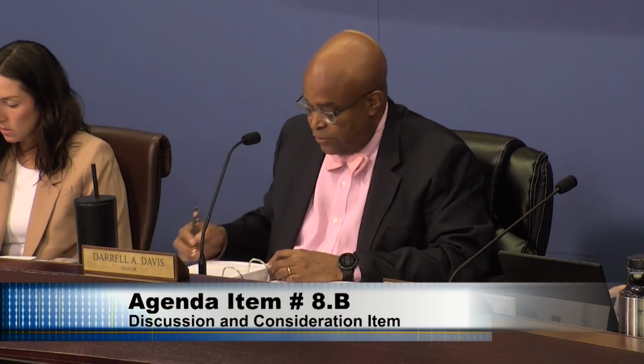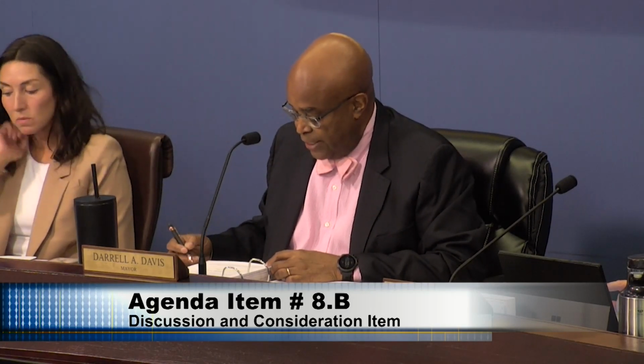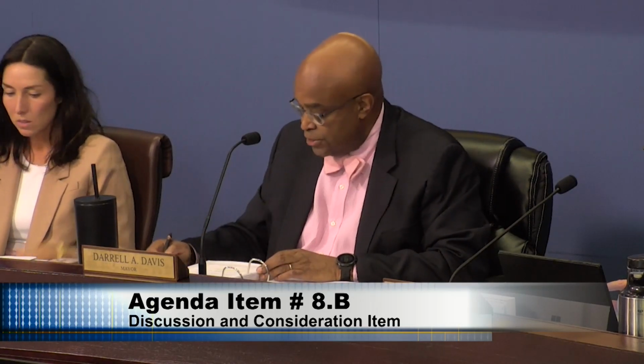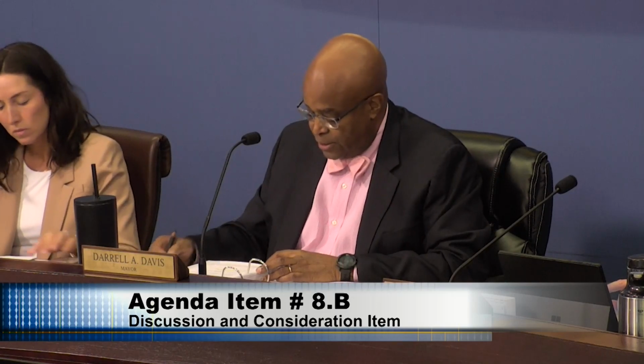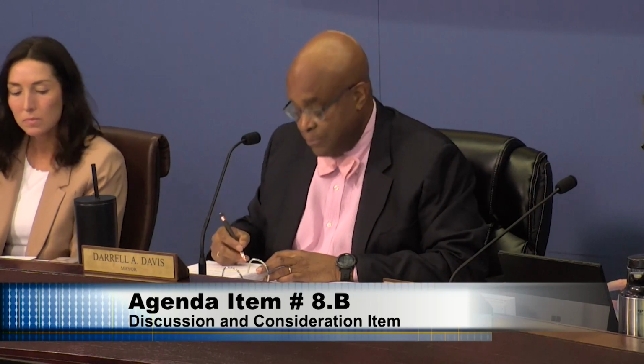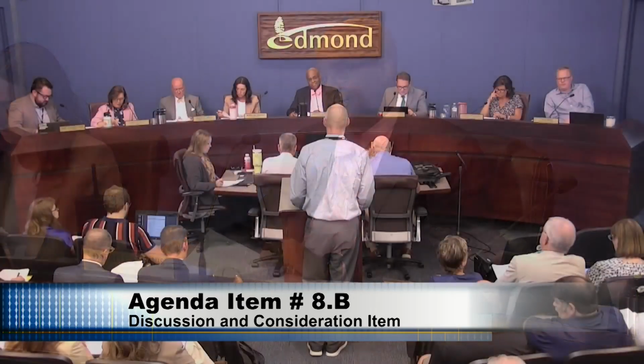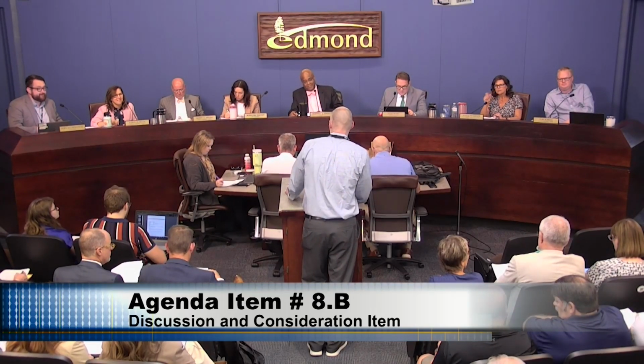We have item 8B, which is the consideration of approval of a contract amendment with Crossland Inc., Construction Manager, for the guaranteed maximum price GMP 1 for Phase 1 of the AC Caplinger Ballfield Renovation Project to include demolition, earthwork, general conditions, project requirements, insurance, performance bond, and owner's contingency, and resolution number 26-24, appointing a purchasing agent for $2,052,473.56.